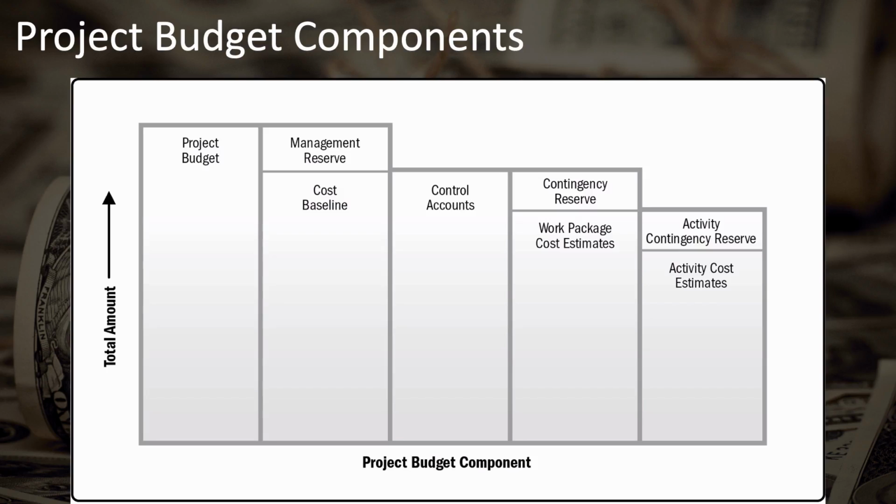All of these work package cost estimates then add up at certain points in the work breakdown structure that we discussed earlier, which are called the control accounts. The work breakdown structure will probably have several different control accounts that are collections of different work packages. These are points at which you apply earned value analysis to measure the performance for different areas of the work breakdown structure. This would allow you to measure performance for and compare performance between different phases of your project or for different types of costs, such as people versus equipment, vendors, or materials.